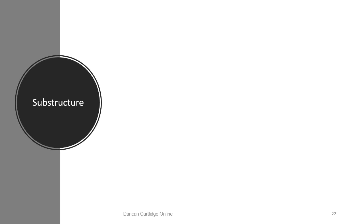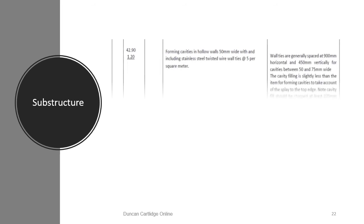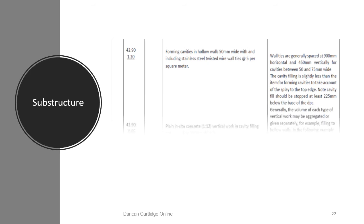This page contains yet another two items that can utilise the mean girth. Forming a cavity and building in wall ties is a measurable item, as is the concrete cavity filling discussed earlier. Even though the concrete filling is only 50mm wide, it is measured in cubic metres.